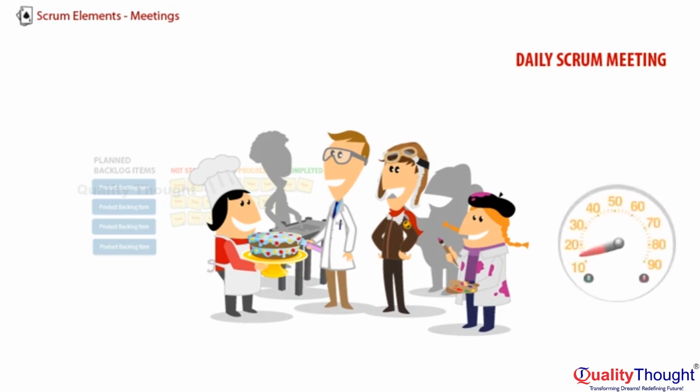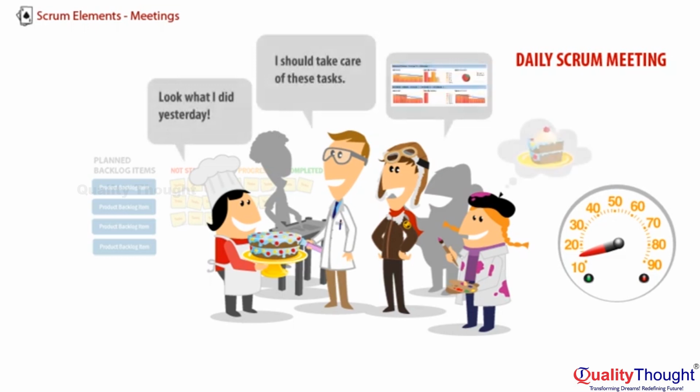During sprint execution, the team meets once per day for a 15-minute daily Scrum. If we're collaborating, we're meeting all the time, of course, but this one official meeting is defined where we stand up and find ways to help each other. We talk to each other, not to the Scrum Master, not to the product owner, not to any kind of boss, but the team. I talk to the 6 other people that are my team members. I look them in the eye and tell them what I did yesterday, tell them what I'm going to do today, and what impedes me, what are my blockers. Then I toss the ball to someone else on my team, and they talk to the rest of the team.